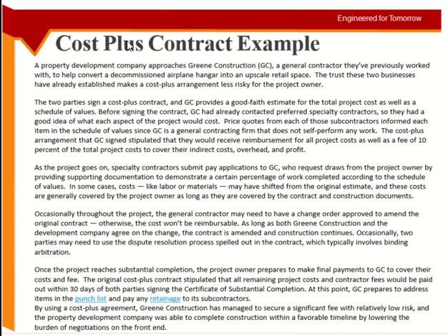So he will submit the invoice from the subcontractors, and he will also submit the proof about the percentage of work which is done. Okay, and he also has to show if there was any cost which has shifted from the actual or initial estimate. Okay, and those will be covered by the client. Obviously, if there's a cost overrun, an extra cost, because the contract is open, right? So he will report the cost, but it will be covered by the client. Okay.